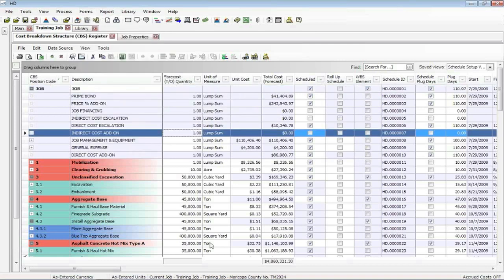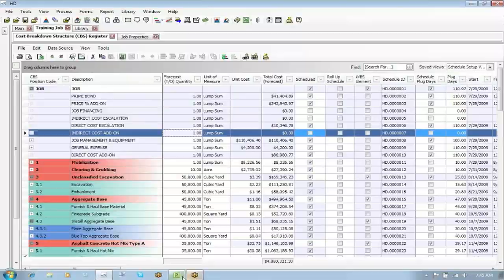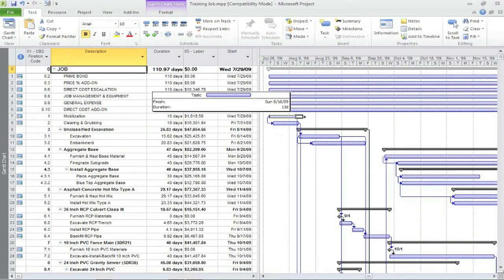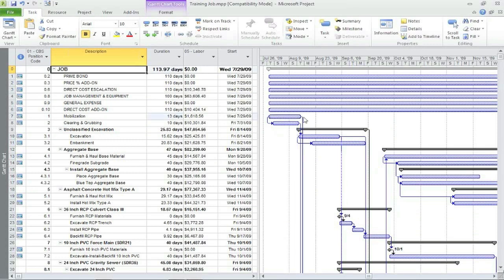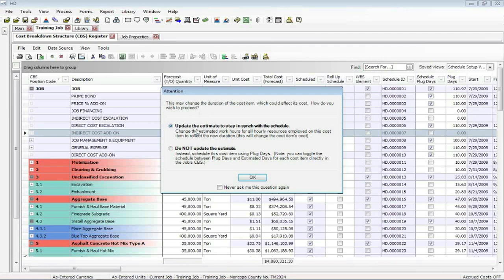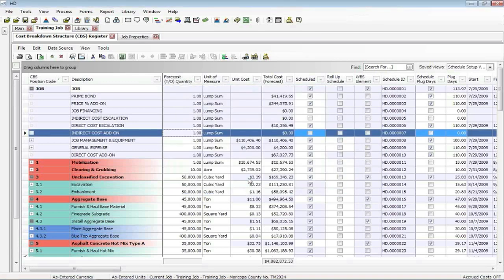So I'm going to go back into project. I'll take my mobilization and I'll just change its duration. When I alt tab back to hard dollar, I'll see this attention box. What do you want to do? Do you want to update the estimate to stay in sync with the schedule with that new duration I just entered or not? It's your choice. You can decide what you want to do. I'll say okay. Basically, I just changed the cost for mode because I gave it new durations.